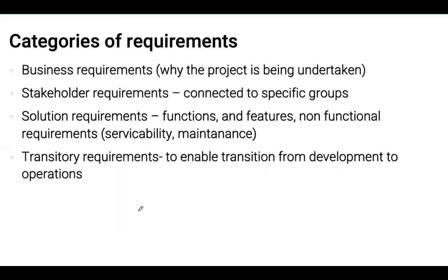And then transitory requirements are related to, I suppose, the time after the project is closed and the product is produced and it's going from the project team to the customer. The customer might have requirements related to how that transition process is going to be carried out. So maybe there is going to be a requirement for a period of training. Maybe there is going to be some requirement for facilitation of a given widget cranker and so on.